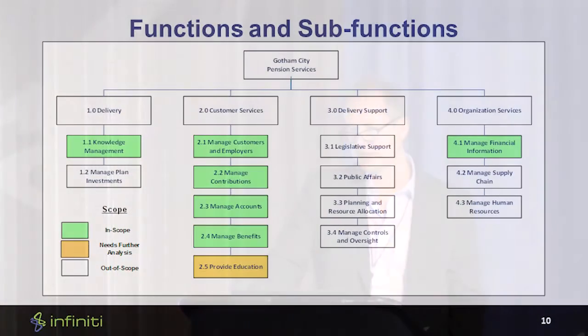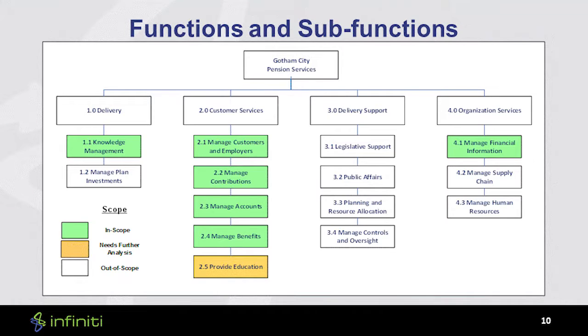We also have these orange ones. So we advocate taking a wide cut approach. So kind of like no man, no soldier left behind kind of thing, right? It's kind of like that with our business processes and our sub-functions. We don't want to miss something, because if we come back later on, we know that it's going to cost twice as much, take two times as long, and impact the schedule, right? So we want to include those at this point.